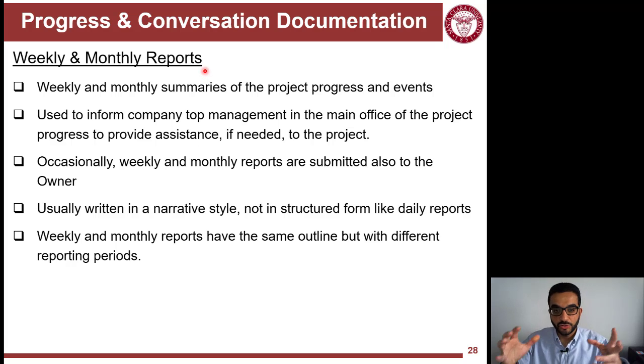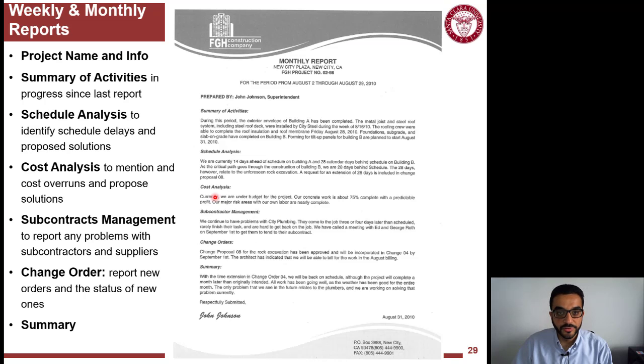And then there are weekly and monthly reports. Now we're not getting into internal documentation anymore. We want to share the summary of what happens daily on a weekly and monthly basis with the bosses in the offices who are following up with us on project progress. The top management is now involved in these reports. The project executive in the company office reads these from the project manager or superintendent, and they are a basis for discussing whether the project is going well, or if you need more help or more staff.